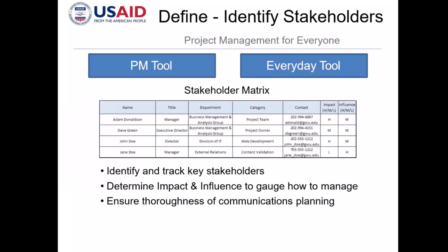Actually, I even classify them if they have a high impact or medium impact to the project. So even the influence that they bring into the project, I normally put a categorization so that I will understand. For example, if there's a conflict in the project, who would be the most influential of all that I need to satisfy?